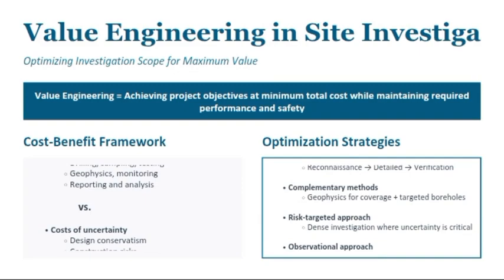I also remember that Prof gave an example in our last meeting of a very bad road, where the engineer decided to locate the place with the worst geology and do a very good job there, because they couldn't have put that kind of reinforcement in all of the road. So they chose the place that had the worst geologies, the most problematic areas. These are some of the things that you put into consideration in value engineering. Also look at environmentally sensitive regions.